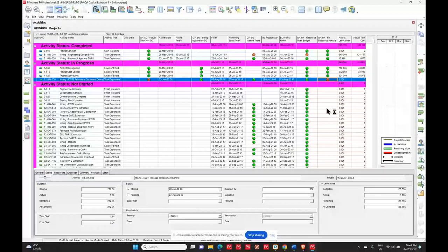is another one that, depending on the circumstances that you're dealing with, is always valuable, in some cases more so than others. And I'll give you an example. I've been at 2 different client sites where somebody wasn't clear how they should be updating activities in P6. And as a result, the actuals were not calculating. Unfortunately, we found that out after about 300 activities had been updated incorrectly. Now, this will tell you right away. So that's another check that you can run.